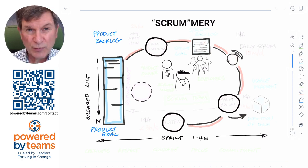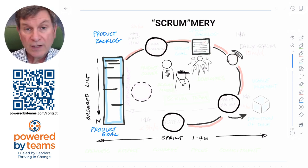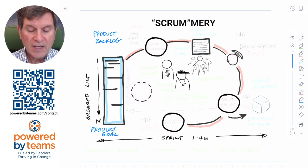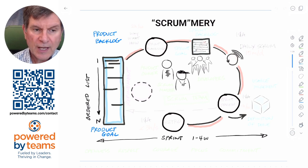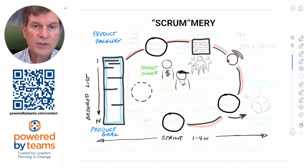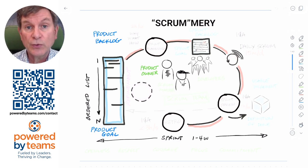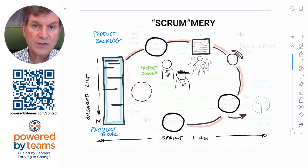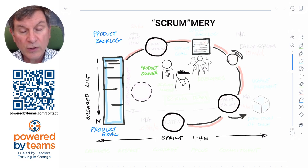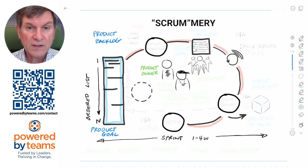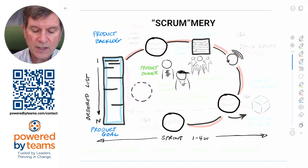If things don't fit with the product goal, they don't belong in the product backlog, and if they're not in the product backlog, the team probably shouldn't be working on them. The product backlog is owned by one of the accountabilities in a Scrum team — the product owner — who is a single individual, not a committee. Their chief responsibility is to order that product backlog in order to maximize the value of the product resulting from the work of the developers.